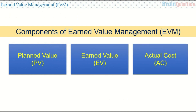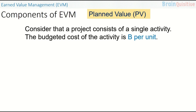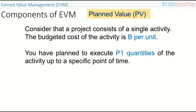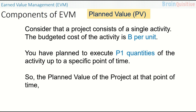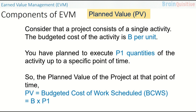Now we will see these components in detail. What is planned value? Consider that a project consists of a single activity. The budgeted cost of the activity is B per unit. You have planned to execute P1 quantities of the activity up to a specific point of time. So the planned value at that point is the Budgeted Cost of Work Scheduled, or BCWS, which equals B multiplied by P1.